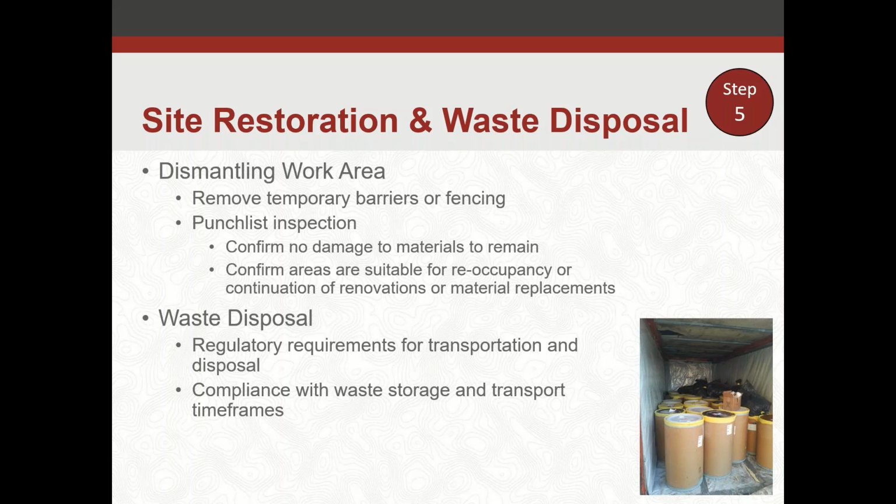So we want to make sure there's no damage, no residue left behind, and everything's in good condition. Waste disposal: there are regulatory requirements for transportation and disposal, also for storage and transport timeframes. You want to make sure you're not storing that waste on site for too long. If you're dealing with hazardous waste, as a small quantity generator you're looking at 180 days generally, or 90 days for a large quantity generator. So you've got to get that waste out of there in that time frame. So plan for that accordingly.